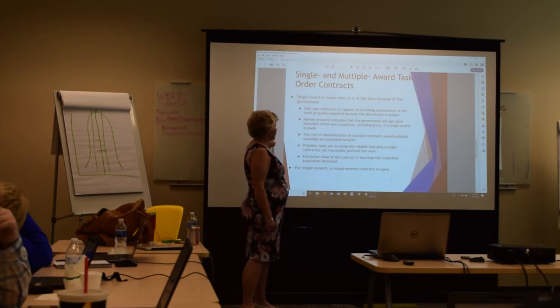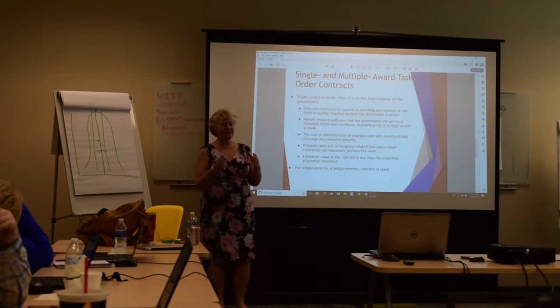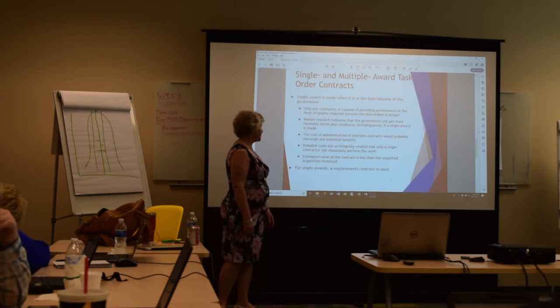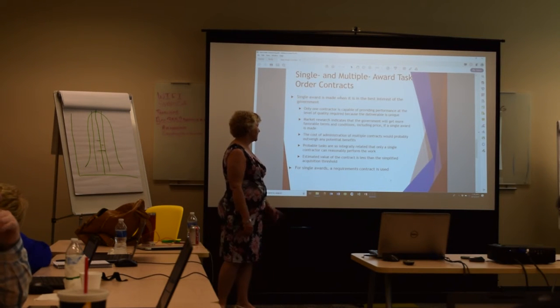Probable tasks are so integrally related that only one contractor can reasonably perform the work. So if I'm doing the same thing in Norfolk as I am in San Diego, and the government cares about standardization, which they usually do, the government would be more likely to award both of those pieces of work to one contractor, just because it provides that standardization.